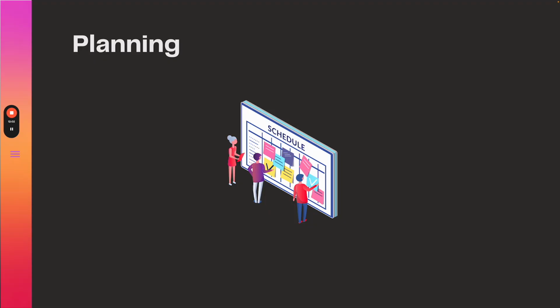Also think about the risks associated with the project. So identify your potential risks and develop a plan to mitigate or manage them effectively. So for example, there might be a feature that you're wanting to implement and you assume that your chosen no-code tool can do that thing. When it gets down to the crunch, you may find that you can't do that thing. So what is your plan?